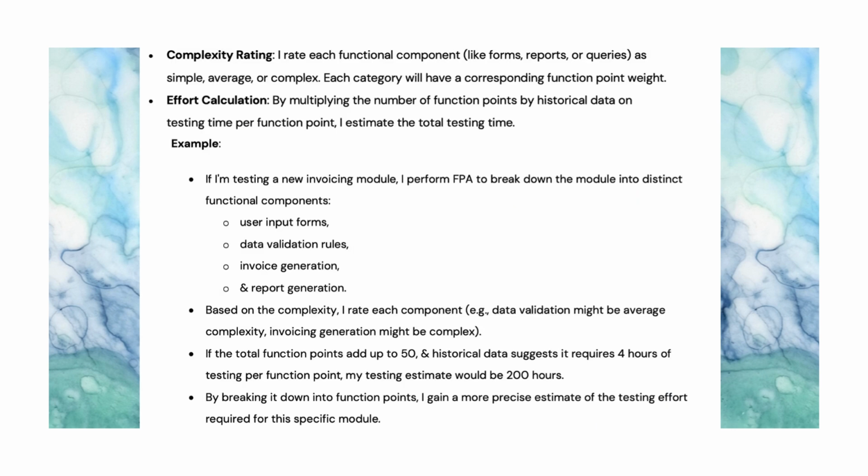If I'm testing a new invoicing module, I perform FPA to break down the module into distinct functional components. User input forms. Data validation rules. Invoice generation. And report generation. Based on the complexity, I rate each component, e.g., data validation might be average complexity, invoice generation might be complex.